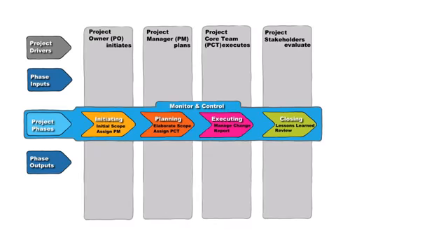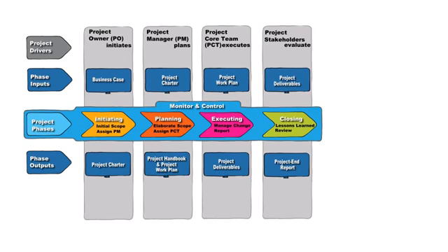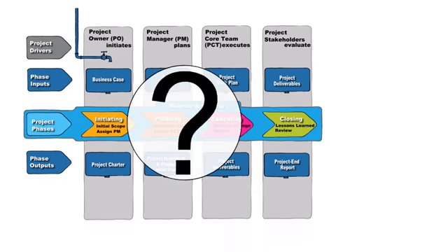The PM2 methodology includes also a crisply defined input-output model. Every phase of the project cycle has input and output. The objective of the initiating phase is to define the project. An MS Word document called the Project Charter contains the defining information, including a description of deliverables to be generated, and is the output. The input is an elaboration on the rationale of the project, stipulated in the business case document. The input to the initiating phase is answering the question, why are we doing this project?